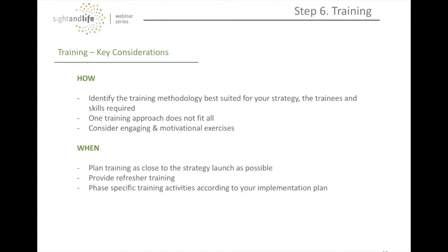The timing of your training is a key to succeeding or failing at making sure content sticks with the staff. Make sure you time your training activities as close to the launch as possible and that you plan for hand-holding sessions, feedback sessions, and refresher training if necessary.